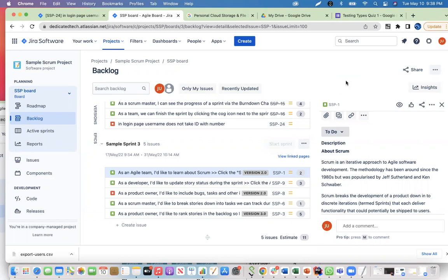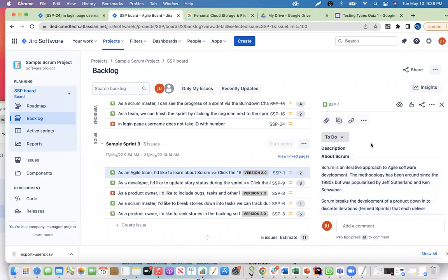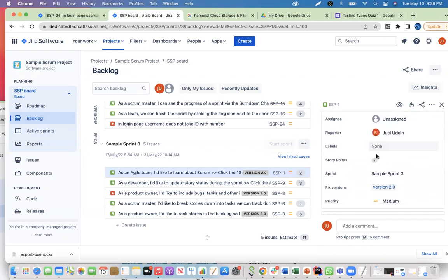So we get the unbiased answer, and then we take an average of that point, or sometimes we take the highest or lowest, depending on whoever can convince the team if it's a 2 point or a 3 points or a 5 points. Okay, and the point can vary. 2 points means like 1 day of work, for example, and then 3 points means two days of work, right? So based on the length, how many hours it takes, the point will be.